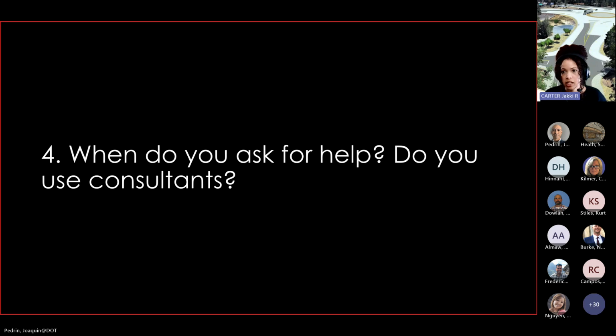So what determines our level and type of visualizations is our kickoff meetings with our project managers and our project leaders. For our kickoff process, we receive the request. We meet with the project leader to discuss the story, much like Kurt covered, that they would like to tell through the deliverables that we develop.